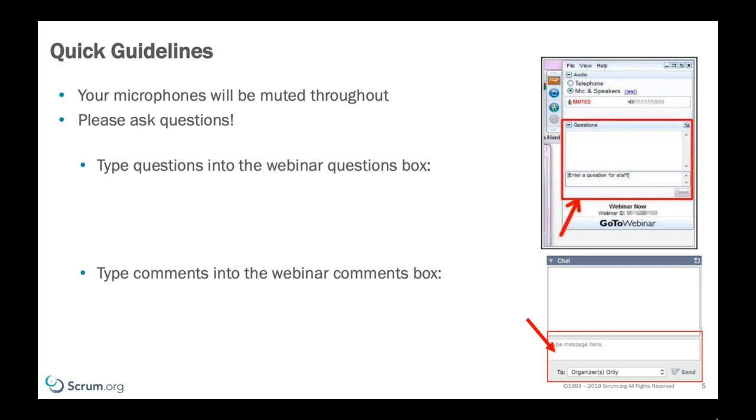So the key problem that we run into with the old Tayloristic model is that when you're doing budgeting and you say we've got 50,000 for this project and we've got 50,000 for this other project, so project A has 50,000 and project B has 50,000. What if, over the course of the 3 months you're going to deliver both projects separately with separate teams, all lovely Scrum, working really well, project A becomes a lot more important to the business? Do you have the facility to move teams from project B to project A because it's become more important?